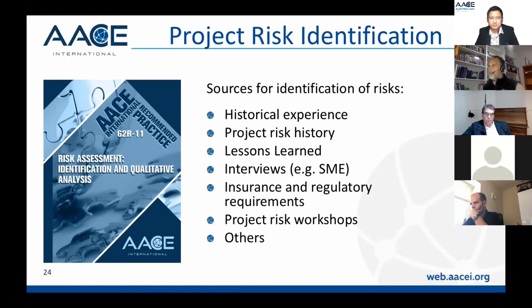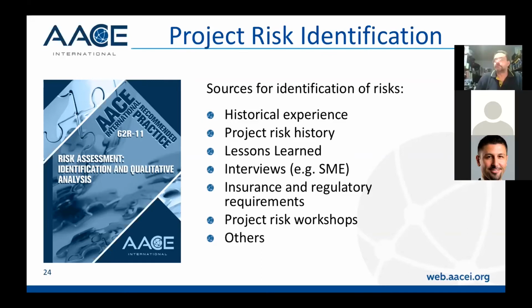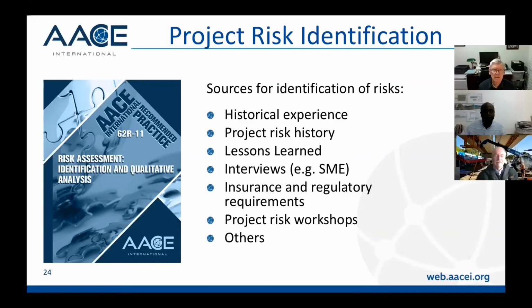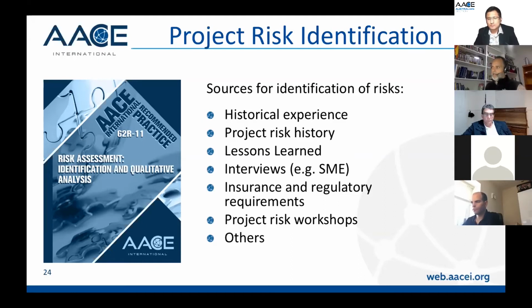What are the sources for identification of risk? Historical experience, I guess nothing beats your own experience when you're doing risk identification. If you are working on a project that is already in delivery, there is the project risk history, and whether you already closed some of the risks from the previous stage. If you are bidding a job that is construction only, but you know the design hasn't been properly closed and they still have some design issues to resolve, even though it is a construction only contract, you know there is going to be some risk.